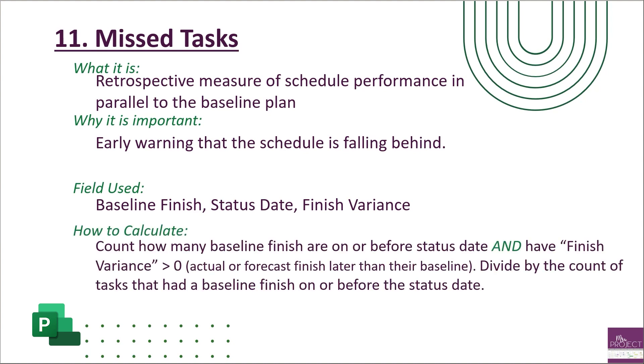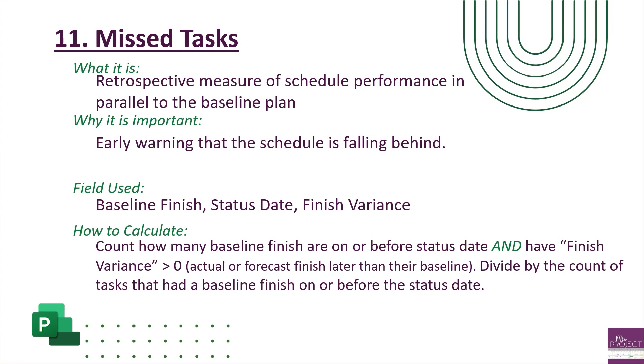How do you calculate this? You're looking at your baseline finish and count how many of those tasks have a baseline finish that is on or before the status date and has a finish variance greater than zero. Your finish variance isn't just calculated on your completed tasks, which is where you would find your actual finish, but also on your forecasted finish. That's why you're looking at your finish variance. Then divide that count by the tasks that have a baseline finish on or before the status date. The goal is for your metric to remain below 5%. Anything greater than five is an early indicator that your schedule is definitely falling behind.